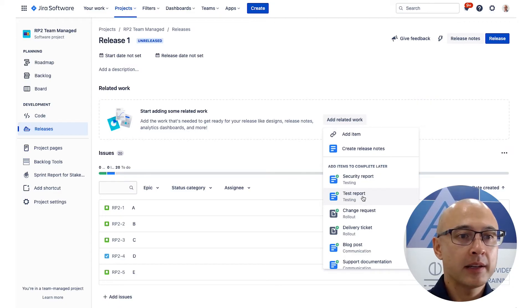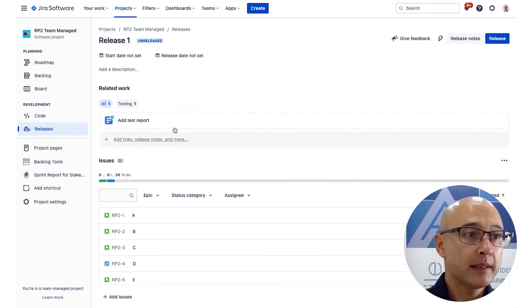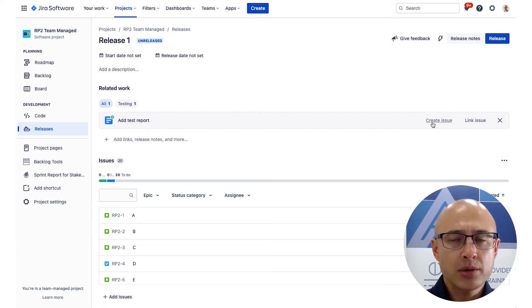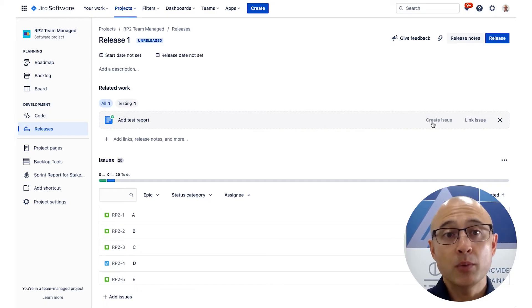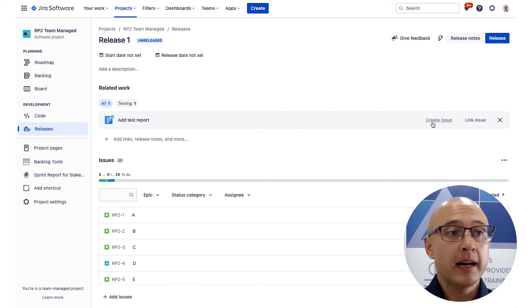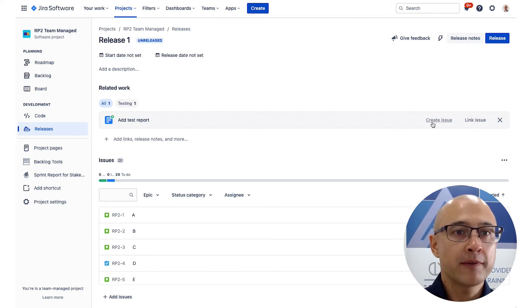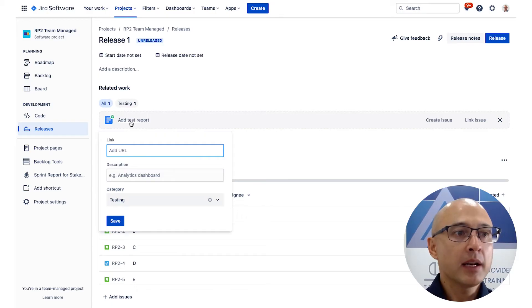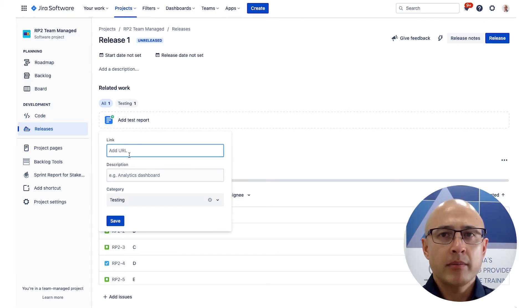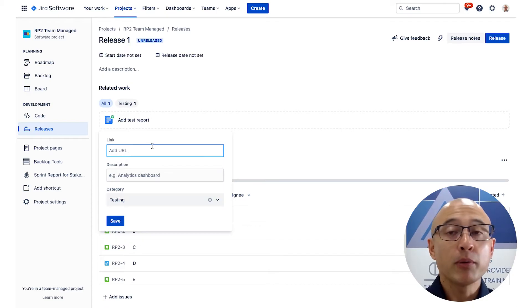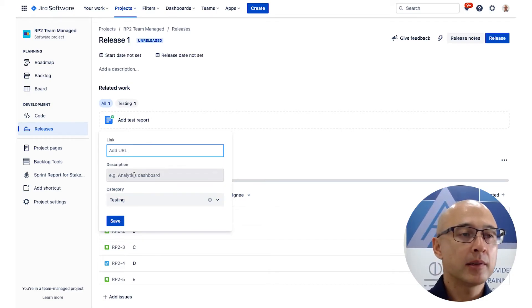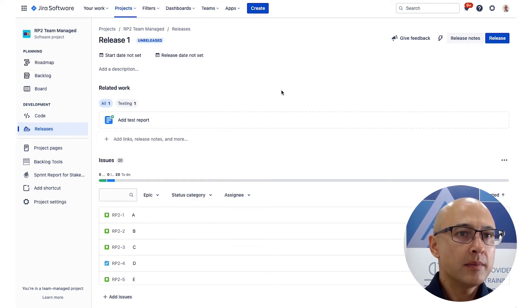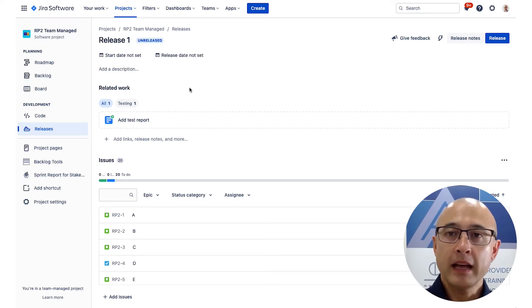So you can attach that on and you'll notice that, let's say I click on test report here, it will allow you to create an issue related to that document. So let's say you wanted to add a product backlog item for creating the test report, you can do so from this view. So it's useful. And when you click on it, you can also add a link to that document. So the document might be created in Confluence, or you might be creating it in a Google Doc or wherever, you can put a link to it there and a description. So others might be able to have a look and track its progress. So those are the details that you can add to a release.